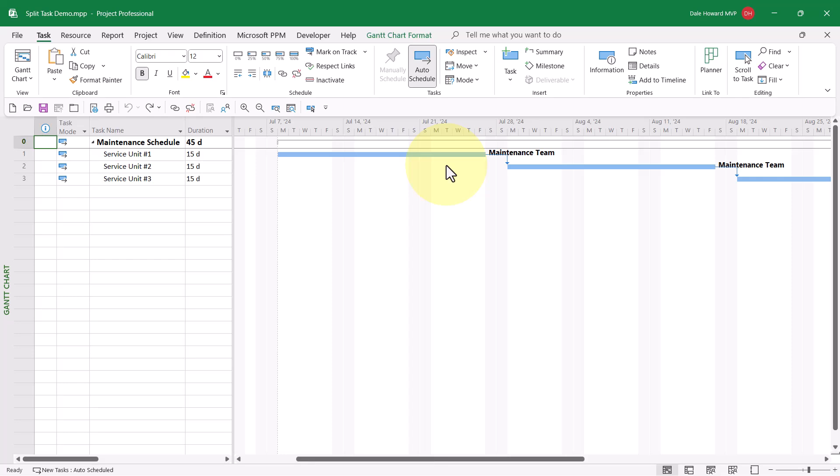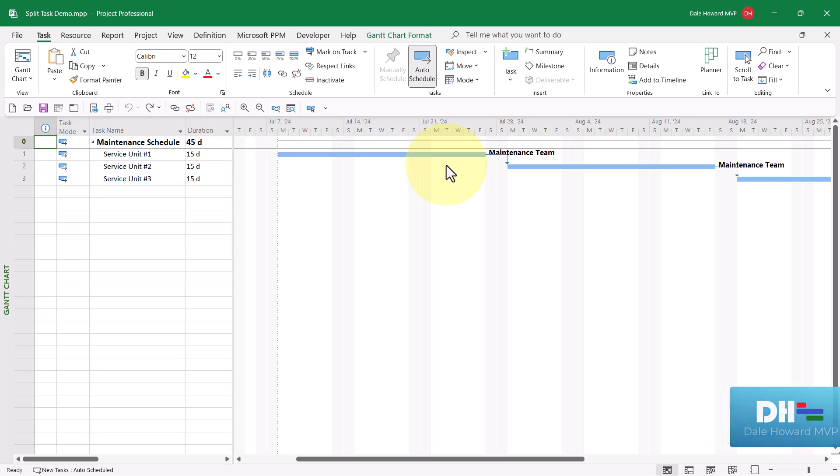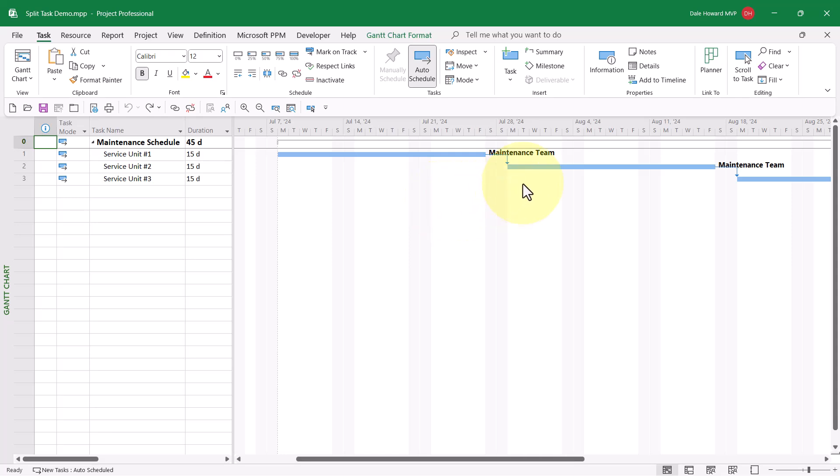However, during the week of July the 21st, there is a planned outage that will prevent any maintenance work from being done on this task. Therefore, I need to move the work scheduled during the week of July the 21st over to the week of July the 28th instead.